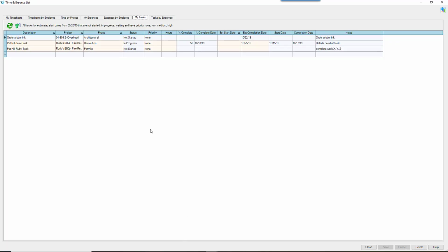I don't know that if I had a big project that was going to end up having 50 to-dos, I would go in and add all 50 to-dos and 50 start dates at the very beginning of the project, because the project is going to change or something's going to get stuck and all those dates are going to be wrong and you're just going to have to update them again. Unless you have a very structured company where everything stays on time, I would maybe look at just adding these tasks every week as the project moves forward.